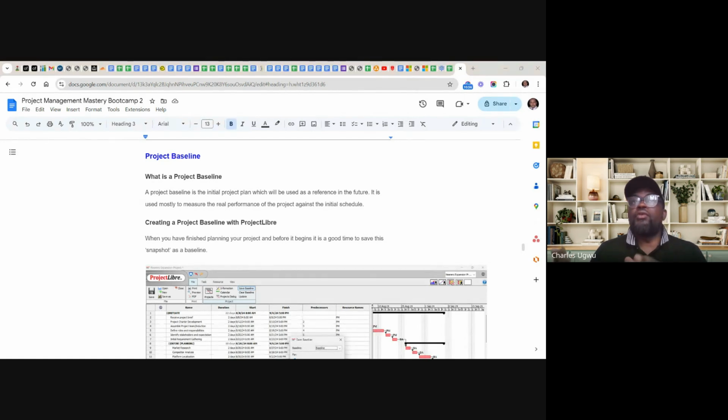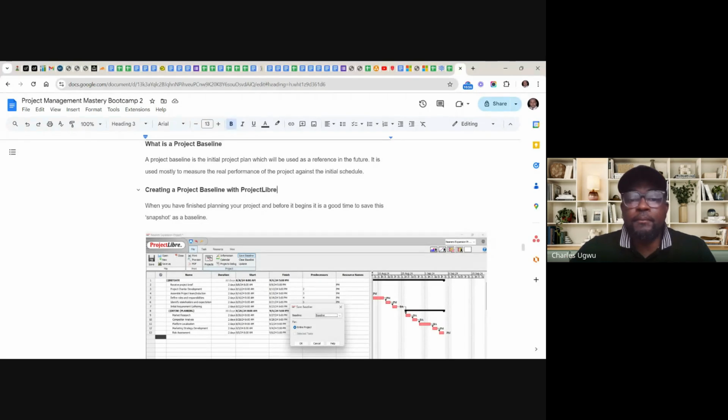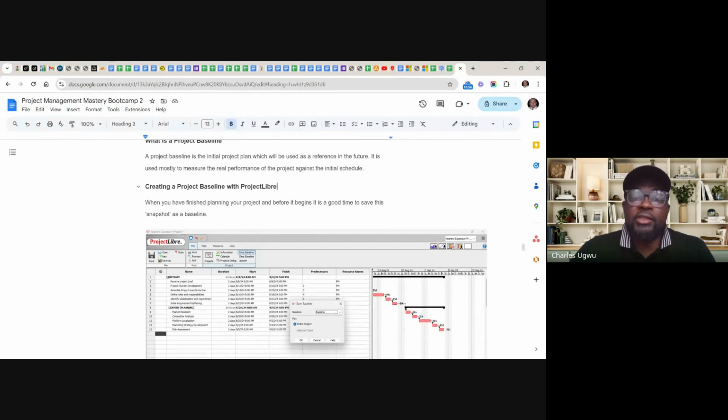So if you are not done with your project plan, don't baseline it. Because once it's baselined, it has to be approved. Once it's approved, it means you are done with your project plan and ready to start implementing that project using that project plan.